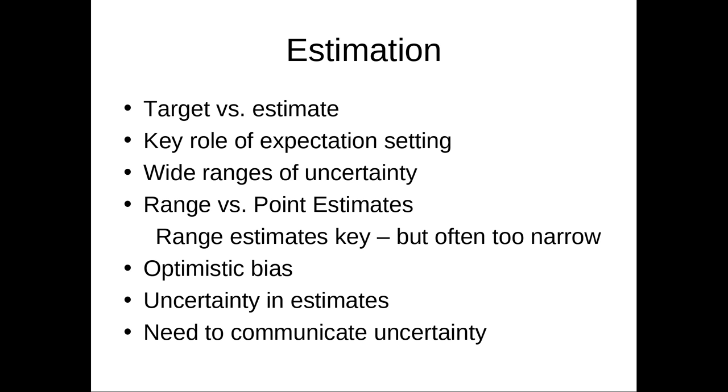It's a very, very detailed accounting for what's required. And there, for each of those items, you estimate how long it's going to take. And then you combine those. And it turns out that's just a much better considered estimate than just saying, okay, how long is that whole thing going to take. You really want to break it down, ladies and gentlemen. And that's the idea behind what's called estimation by decomposition.